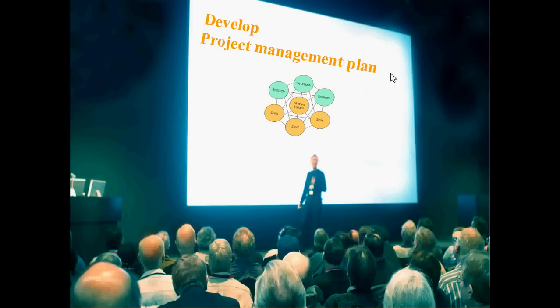Let's recap what we've covered so far. We started with project initiation, where the inputs were the statement of work, a copy of the contract, enterprise environmental factors, and organizational process assets. There are two steps in initiation, both done by the project sponsor: develop a project charter, and prepare a stakeholder register. During the charter process, a project manager is identified and appointed, who then takes the project into the planning phase.